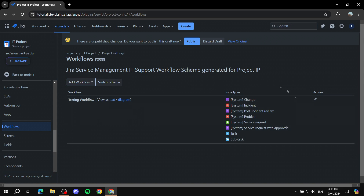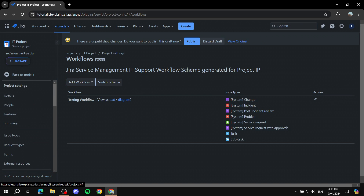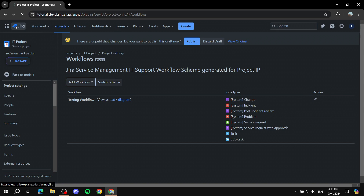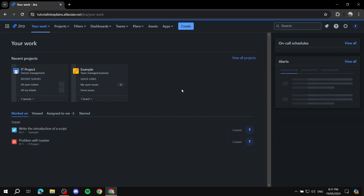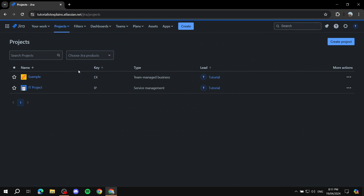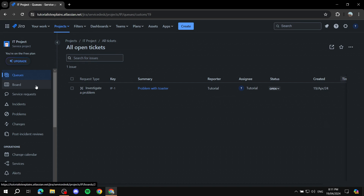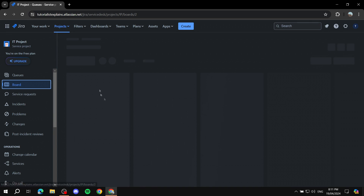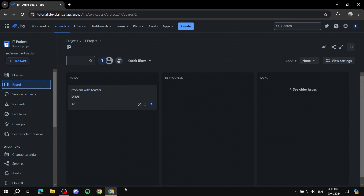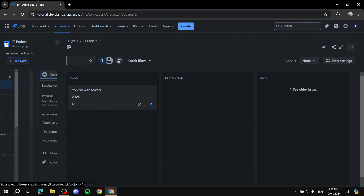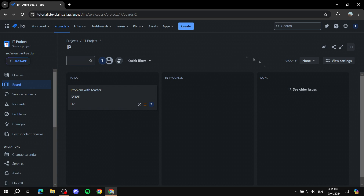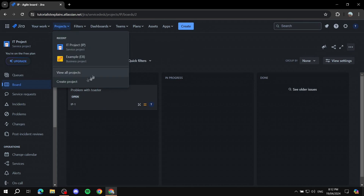Make sure to assign the statuses properly. If you already have a template with an existing workflow running, you'll need to pay close attention to the existing statuses — they could cause conflicts. Usually it should work fine, and you should see To Do, In Progress, and Done update accordingly. If you started from scratch without a template, applying the workflow shouldn't give you any problems.